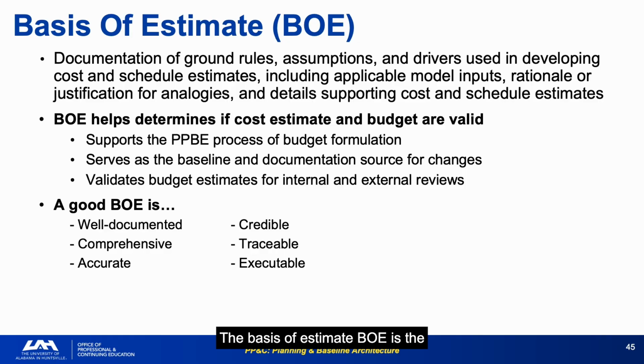The Basis of Estimate, BOE, is the documentation package that explains how and why a cost estimate was developed. It is the audit trail that makes an estimate reviewable, reproducible, and defensible. A good estimator will have a good BOE. If you're reviewing a program and the BOEs are thin, superficial, or missing, that suggests something about the quality of the estimates they support. 6 characteristics define a good BOE: well-documented, comprehensive, credible, traceable, accurate, and executable.